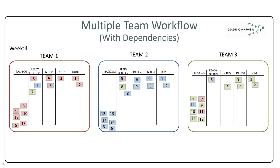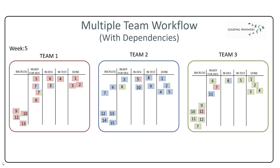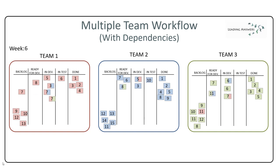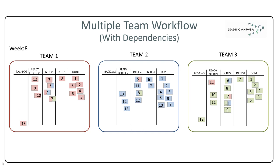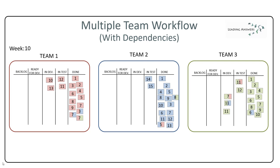Unfortunately, when teams receive work from other teams, they quite often don't think of them as high priority. Obviously they've got their own work to do, and so when another team comes to them, it quite often gets put at the bottom of their backlog. Then we have to work with that team, explain its priority, get it escalated up the backlog so it gets worked on. Typically items get passed to another team, and at best they'll pick them up next sprint or iteration, creating a little bit of a delay.